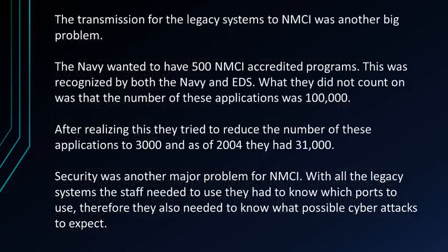The transition of the legacy systems to NMCI was another big problem. The Navy wanted to have 500 NMCI accredited programs. This was recognised by both the Navy and EDS. What they did not count on, however, was that the number of these applications was roughly 100,000. After realising this, they tried to reduce the number of these applications to 3,000, and as of 2004, they had 31,000. Slightly higher than 3,000.